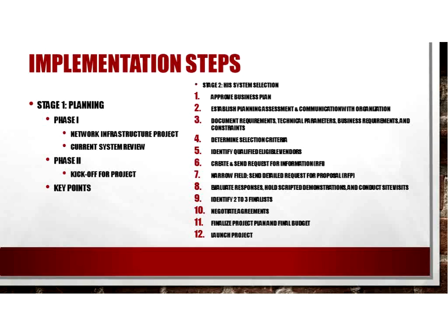So a request for proposal, that's your step 7. You're going to develop that, and it's going to include contracting guidelines, and you're going to send it to that 7 or so vendors that you narrowed down. Your request for proposal is a more thorough document that's going to outline in great specificity your requirements for your system from your usability, technology, and contractual standpoint.